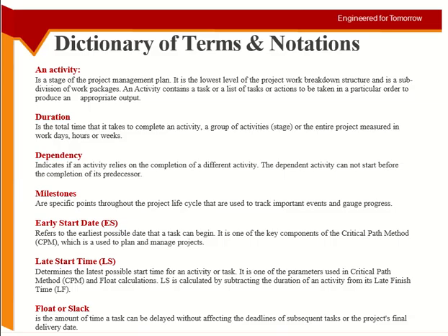Late start doesn't mean with delay. Late start means the start which will not cause delay, an allowable late. Otherwise it can be any late, like after 2 years, 3 years. We are not talking about that late. We are talking about that late start which is still allowed. It will not impact the timeline of the project.